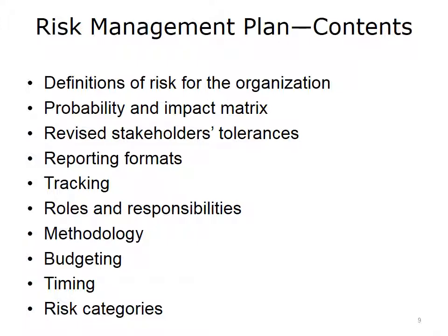The roles and responsibilities of individuals and organizations involved in the risk management activity. Your methodology, information on budgeting and timing, appropriate risk categories. Some information in this risk management plan, such as assignment of roles, responsibilities, and risk categories, will be input during the Identify Risks process.